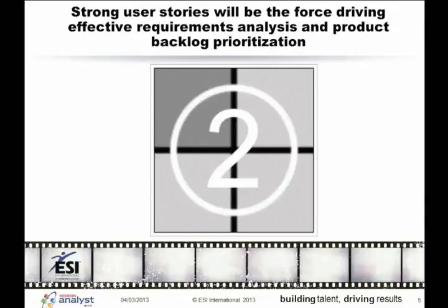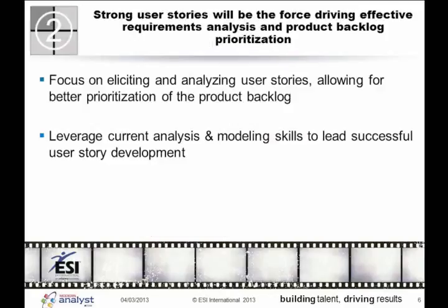Now, this is going to be a challenge for me. Please excuse me if I don't pronounce your name correctly, but Marish Matia asks, what do you mean by an effective user story? An effective user story is going to contain all those different components that are going to help the business achieve the value that they're trying to deliver. Effectiveness means that we've defined the acceptance or success criteria and also defined the different personas that are going to drive it back to the value of what we initially said we were going to achieve when those user stories were implemented. So does it have all of the right components that make up a strong user story to be able to drive, one, the value, but two, also be small enough that the team can take on and deliver during an iteration?